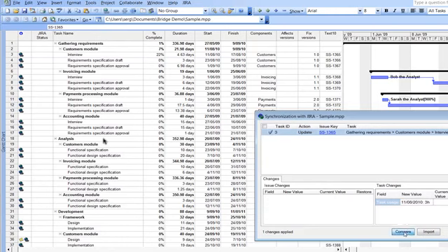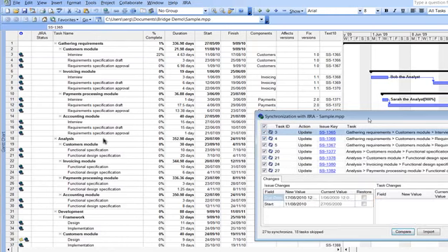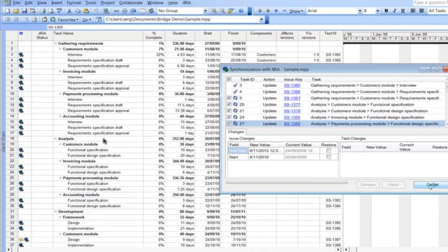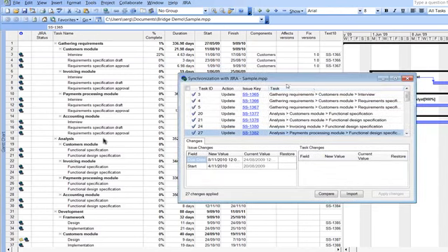So if I compare the data now, what happened? All the dependent tasks were rescheduled. So the bridge wants to update the due date and the start date for these tasks. Now I apply changes, and our tasks in JIRA are rescheduled as well. All the dependent tasks are rescheduled as well.